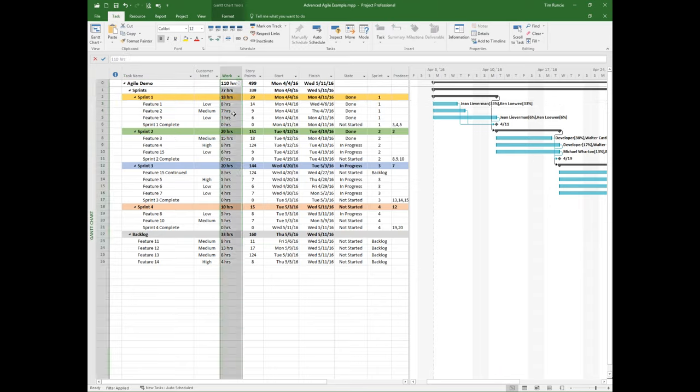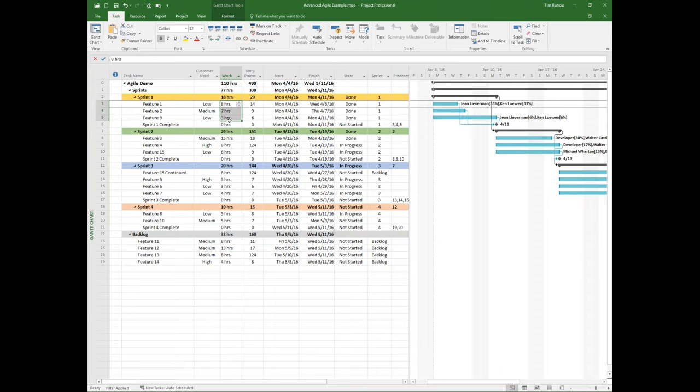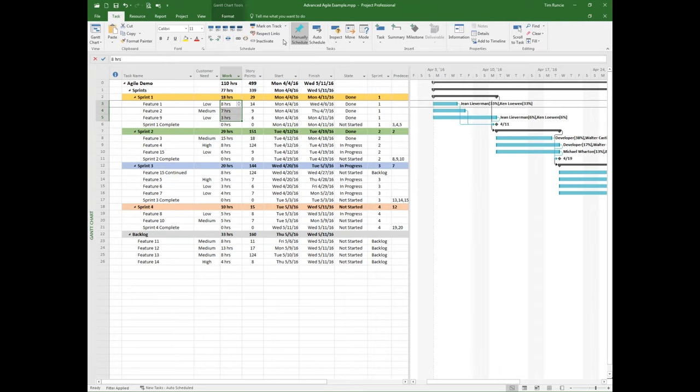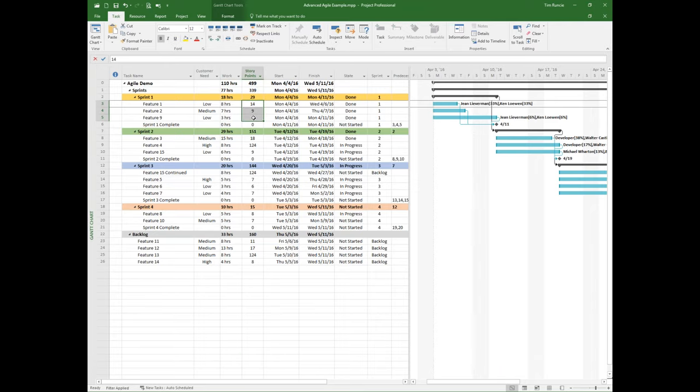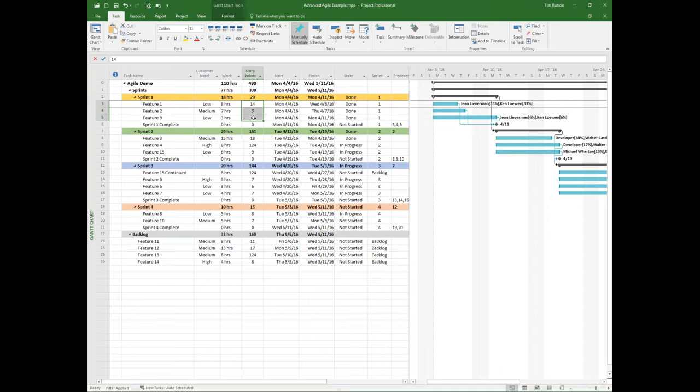Now, as you know, a good project manager in many cases is looking at a schedule of duration, start and finishes. But I also like to get a level of effort. Now, what's hard about doing an agile project is that when you talk to a technical team, especially if you're in IT or development, in many cases, you're doing things that have never really been done before. And so, hence the term story points. The idea is that you can go and say, how complex is this? And whether you want to use shirt sizes, shoe sizes, you'll have these organizations that are in manufacturing will have a certain label. But the idea is that you're sizing how complex it is.